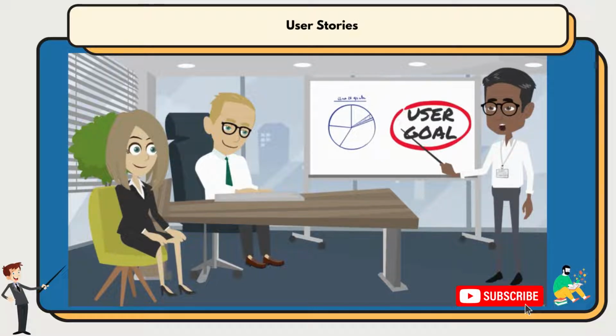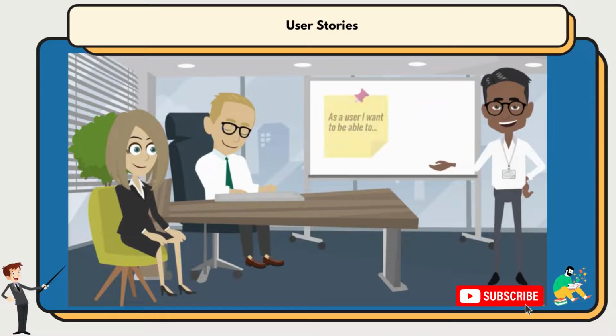So, next time, when you start gathering user stories, try to apply this format. As a user, I want to be able to ... in order to ...